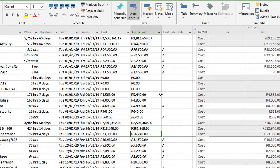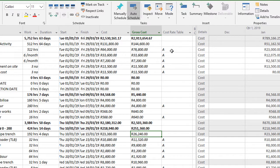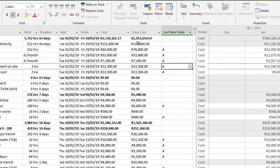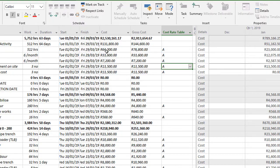So if you only want to use the B rates so you don't want to show them the cost, you can simply again select the B rates for everything and work on that. Once you baseline that, the B rates will also apply in terms of actual cost versus baseline cost, or give you the variance as well.